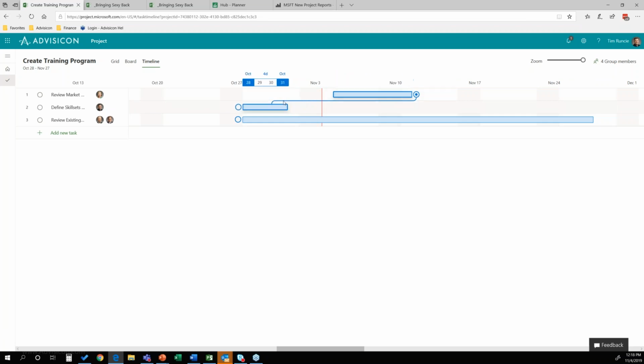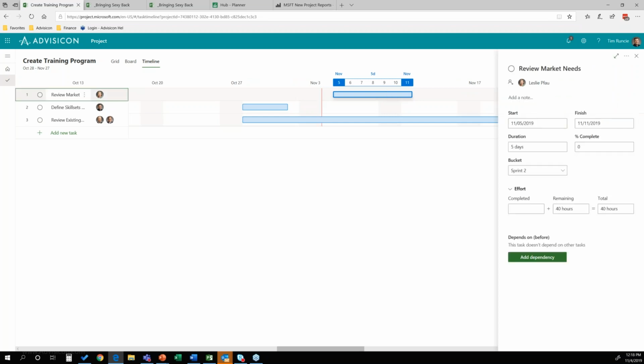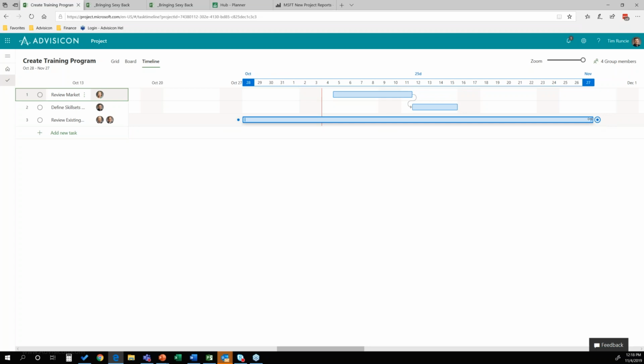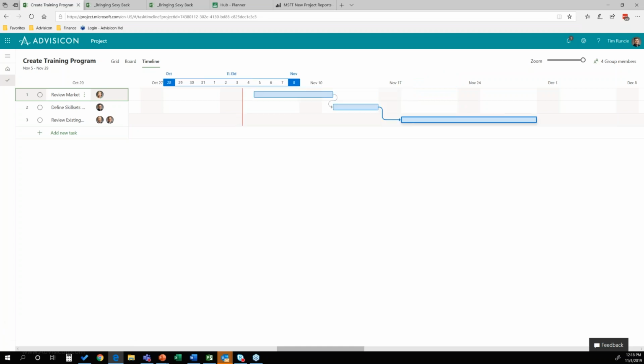I'll just put my mouse pointer right on that little dot, and I'll just tell it exactly what I want to link to. So you can touch these, you can move them around. Notice it's not prompting me with a constraint. I'll just quit clicking here because it moves really fast. But if I come in here and say, yeah, let's just tie it, I put the dot right on the dot, it picks up and moves. I said 4 weeks, but that's a lapse duration. Maybe we can shorten that if I put a couple people on it. Let's link these pieces together, and we can play with these.